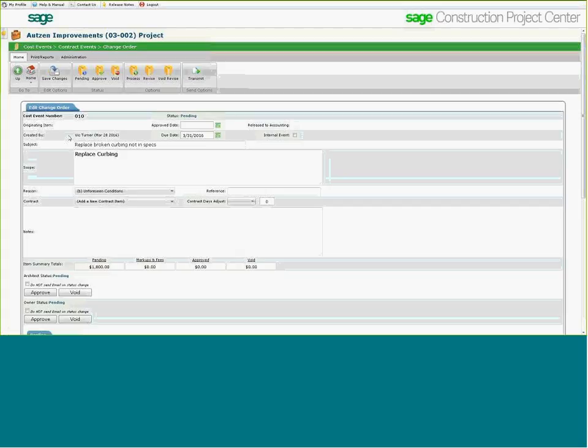And again, the change order here has multiple levels of approval. Maybe the owner has logged in and approved it, and we'll mark down who actually clicked the button and things like that. Who approved it on our end, and are we going to release this to accounting? Everything's flowed through the project center, pushed back into Sage, and now we have everything connected. So workflows now have been added to handle all of the different change management portion of projects as they go through.